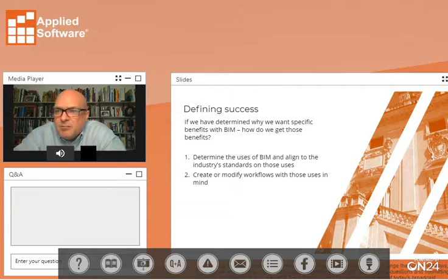And then building specific workflows around those, right? So if documentation is the thing that is really important to you in this process, what's the workflow for that? Who's responsible? Who's checking this stuff? What tools are they using? What are the outputs? What are the steps and decisions? Those kinds of things, being intentional and having a workflow. It doesn't have to be super complicated, but just being able to state those as part of your standards is going to make some improvement too.